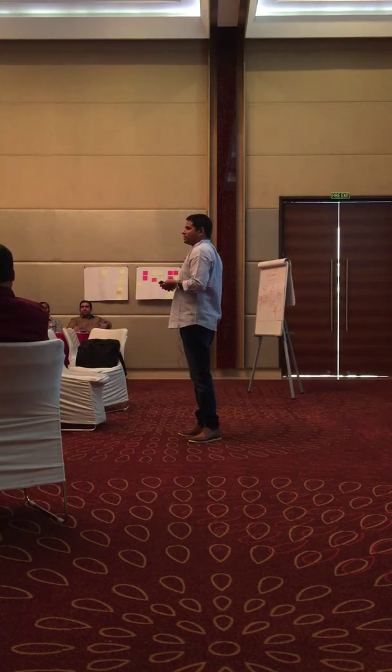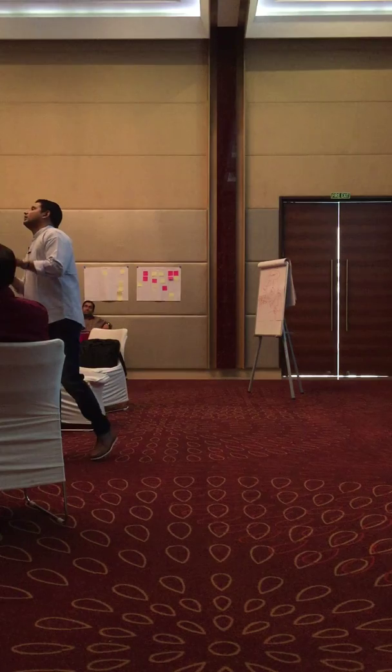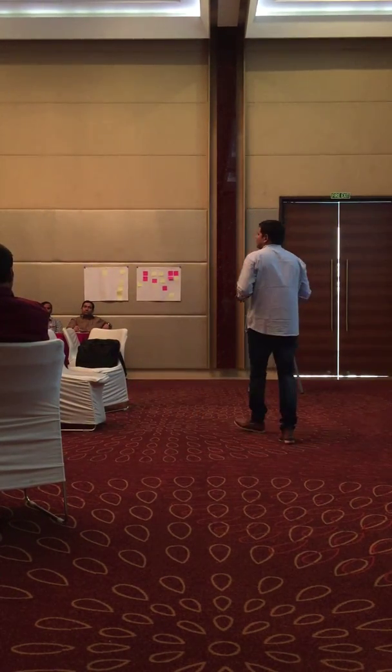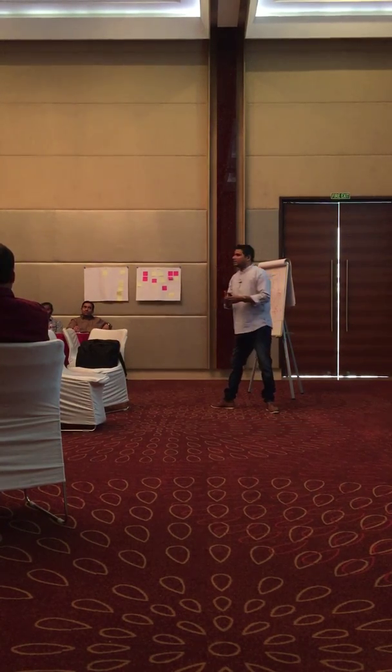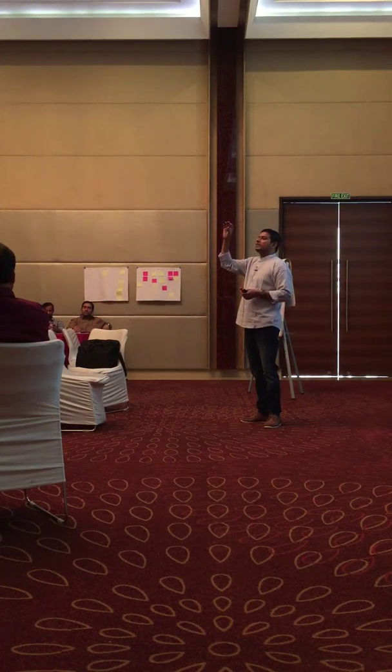Oh, that we will discuss in the next topic, the immediate next topic. Can we move on? Sorry, absolutely. User story is different from task. When I say task, it is technical tasks like analysis, design, development, testing, coding, code review, all these things. User story is related to functionality. Tasks are related to the technology.